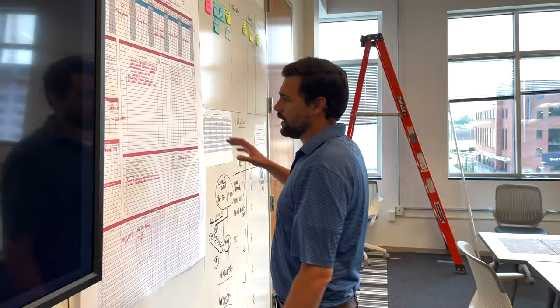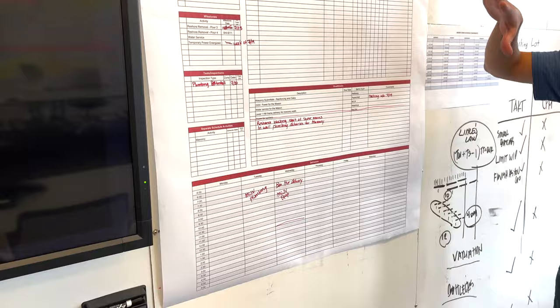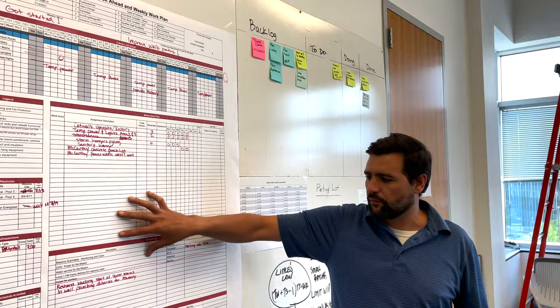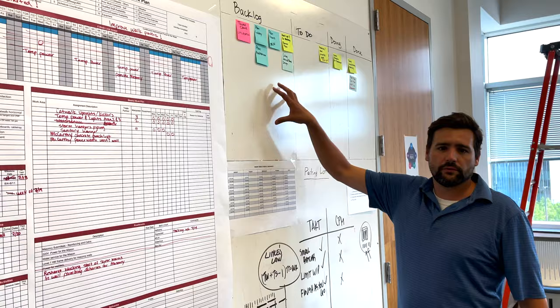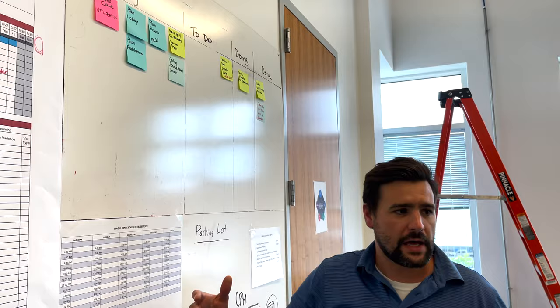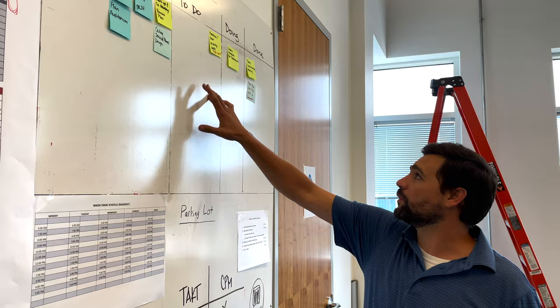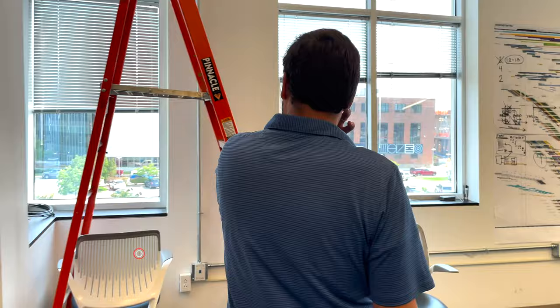We'll start over here — this is where we operate for our weekly foreman's meetings. We look ahead, take our weekly work plans, plan out the work for the week, identify roadblocks, and work through items that come up. We use a scrum process, and items we want to solve but not burden the whole team with go into our backlog as parking lot items.